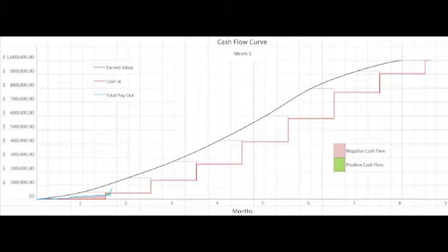You will notice that looking at this line there is a slight incline, however it is relatively flat for the most part. This is due to the majority of the work being subcontracted. However, there is a slight incline because there will be a small portion of the work that will be self-performed. The steeper the line, the more self-performed work the company performs.